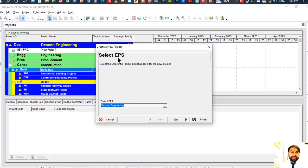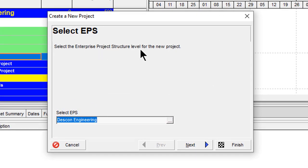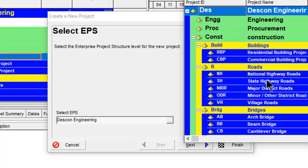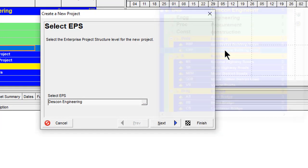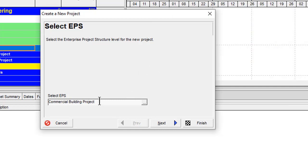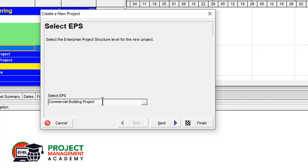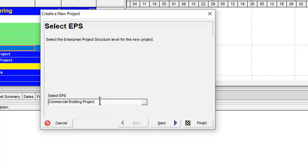First of all we will select the EPS — the Enterprise Project Structure level for the new project. Click on the search button and choose which kind of project you are going to plan. We are going to plan a commercial building project, so double-click on it. Note: before starting you need to have your EPS already created — you can see my other videos on how to create EPS; the link will be in the description.